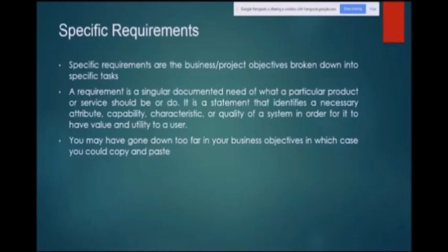The advertisement resource will be available from project initiation to project support. The development resource will be available. So who has validated it, to be validated by, and the status, and agreed subject to the project being initiated by September 2009. So these are all examples and a list of assumptions. We must write them down in a proper tabular manner so that we understand each and every aspect of this project.